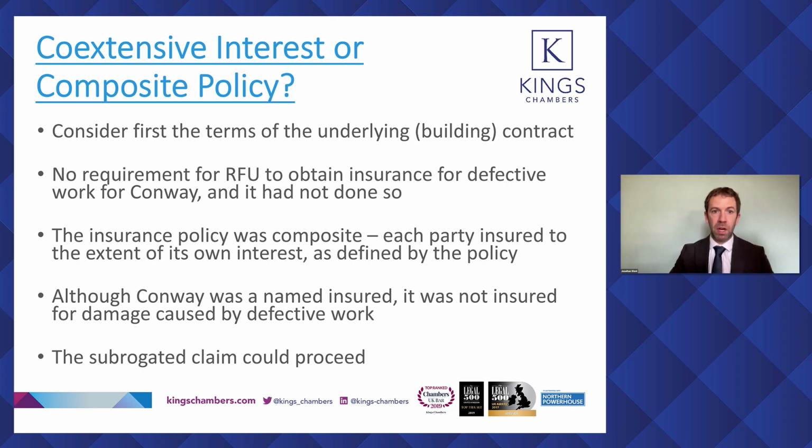It's possible that one party will give the other authority. So to take this example, the contractor may give the authority to the employer to procure insurance cover that is wider than what's required by the building contract. That is possible. But in the usual case, the authority to procure insurance will be coextensive with the underlying contractual obligation to procure insurance. And as Lord Justice Coulson noted, the mere fact that A and B are insured under